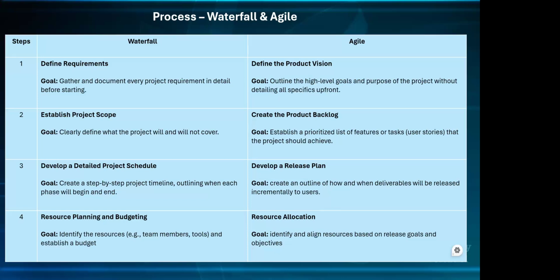And if they're new people that you're getting, again, like I said, if they're not needed for the requirement gathering stage, you're just recruiting them to come in. You don't recruit them before the requirement gathering and say, oh, let them be there. You still need to refine whatever you've gathered. The BA, the PO need to write it out. You still need to do refinement. You still need to clarify for them. So it's like doing double job and paying them for a stage that you don't need them for. Some organizations don't mind them starting off and doing all that. But really, if they are not needed, if it will help to save costs, remember, you're working with a budget also, so you're able to just remove them from that process if possible.